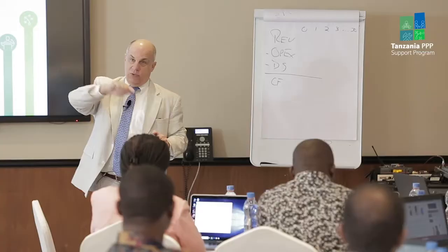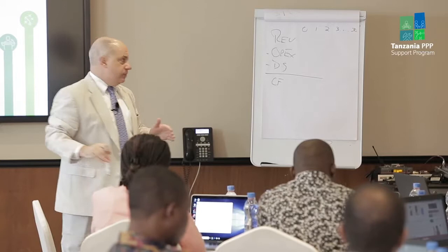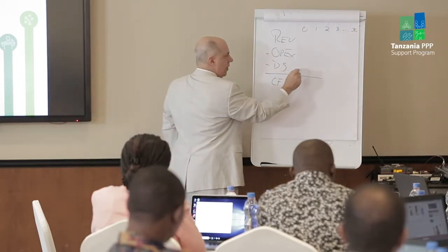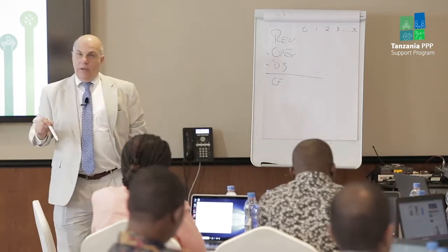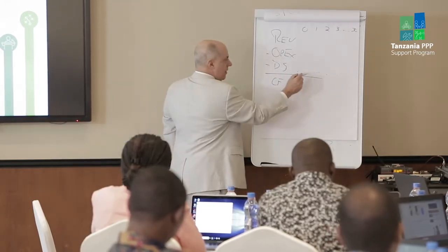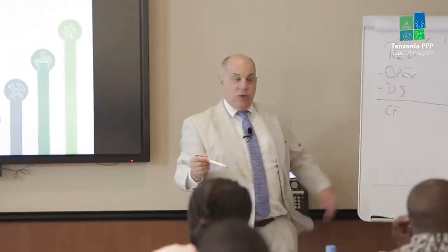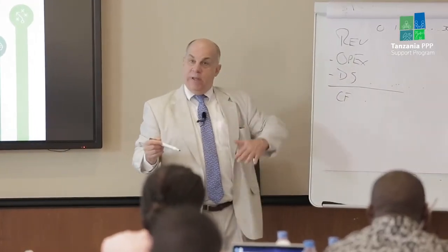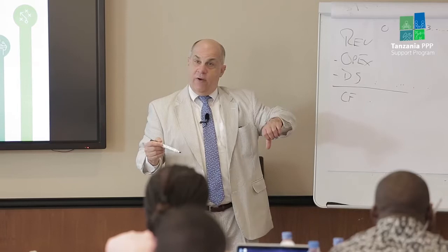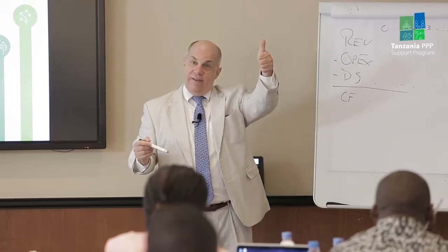Okay? And let's say there is no risk that the interest rate changes for the bank loan. It's going to be steady throughout. Well, we know what our loan payments are going to be each year. But depending on whatever that is, that's going to impact cash flow. Okay? So if the interest rate is high, our cash flow will be less. If the interest rate is low, our cash flow will be higher.